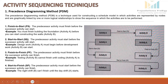The second relationship is Start to Start, SS. The predecessor activity must start before the successor activity can start. For a software project, activity A is design work and activity B is development work — design work must begin before development can start. Another example: in many software projects, testing can start as soon as part of the code has been written. If you are working in sprints, the testing phase can start as soon as coding begins.